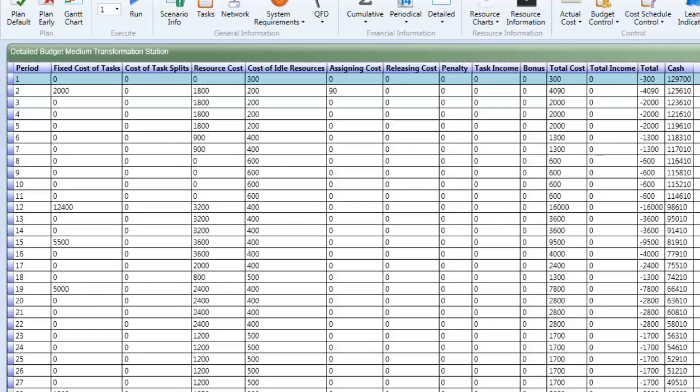In this period, the costs were $300 due to an idle resource cost. Only the construction task started in this time period, and this task has no fixed cost. The task also requires no resources. It is an outsourced task, so all the available resource units were idle. These units are 1 workshop workers, 1 LT worker, and 1 HT worker, each having an idle cost of $100, which sums up to the incurred $300 cost.